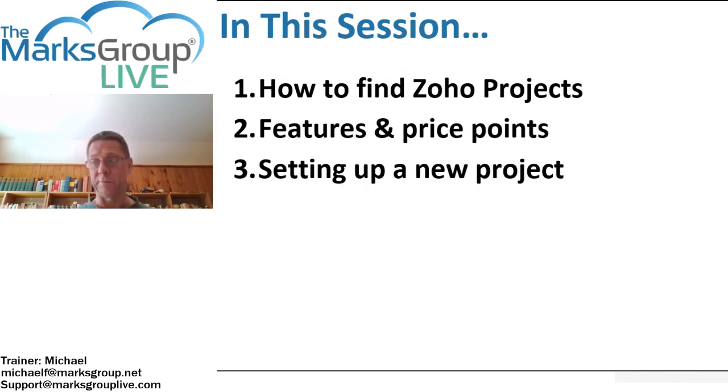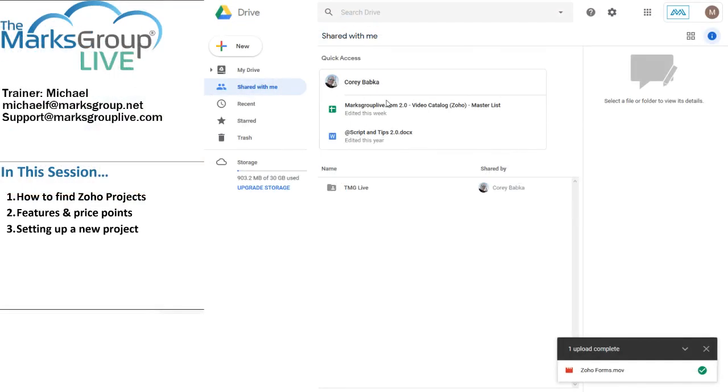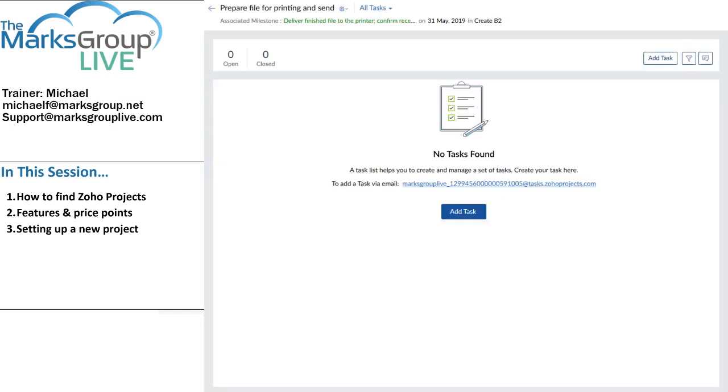Within the project, I can have milestones, and within milestones, I can have task lists, and task lists have tasks associated with them. So there's this multi-layered structure here, where we're breaking down a big task into progressively smaller tasks. Let's go back to here and let me make sure I'm in the right window. There's my correct window. All right.